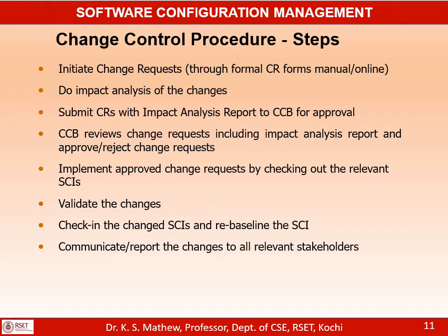All this will be analyzed by the person responsible for the impact analysis, who will come back with the impact analysis report, which will indicate what are the various work products that have to be changed to implement this change request, what is the time required for implementing those changes, and what is the additional effort and money required. All this will be analyzed and reported as part of an impact analysis report. And the change request with the impact analysis report will be submitted for approval to the change control board by the CMIC.